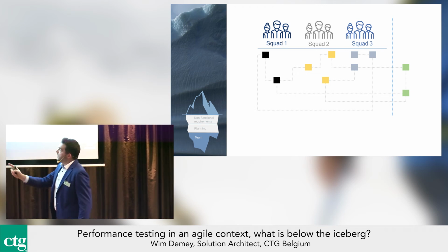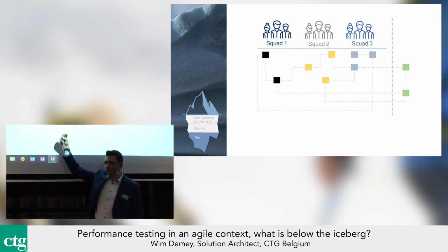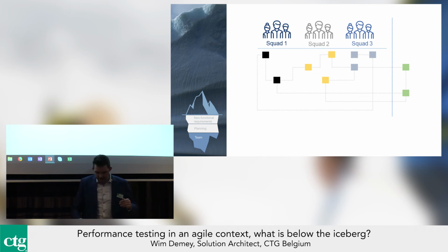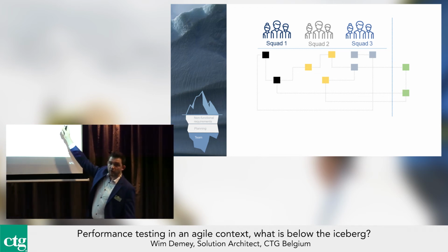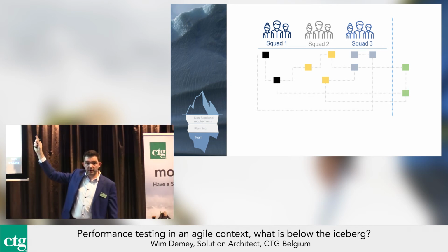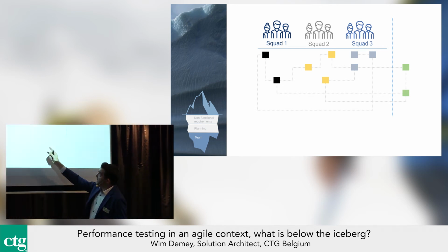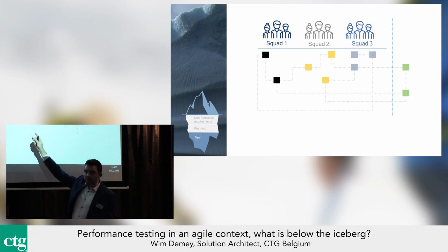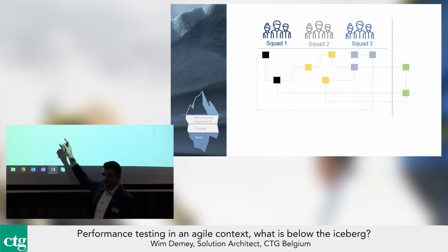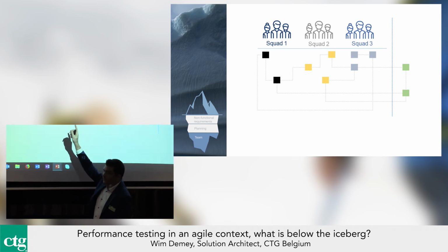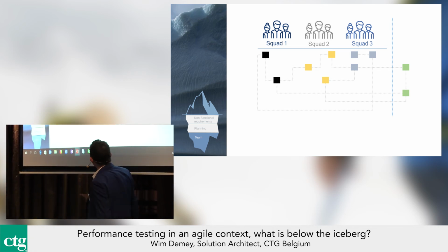Oops, yeah, I need my colleague from the firewall because he needs to open some ports. And maybe you have a connection with components that are hosted externally at a third party. So problem will be that the planning you made, you will not have the support you wanted, because the other squads, they made their own sprint planning and it was not foreseen.